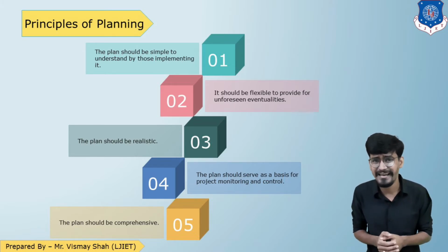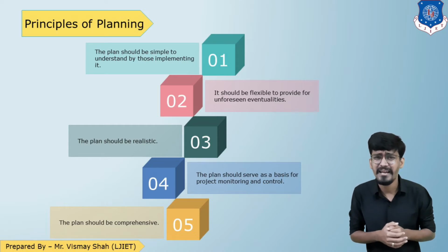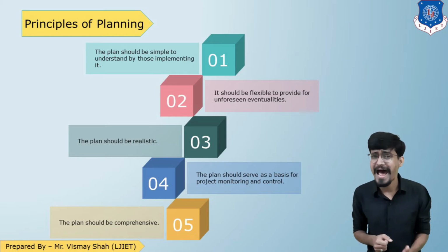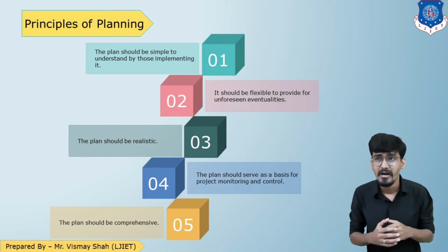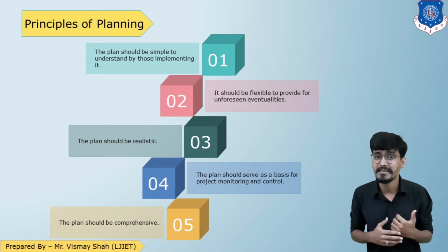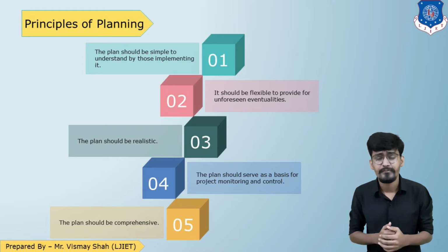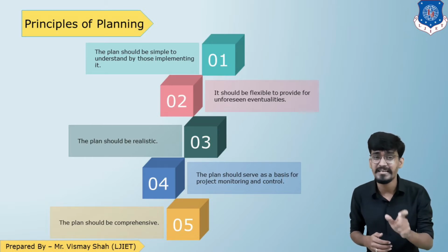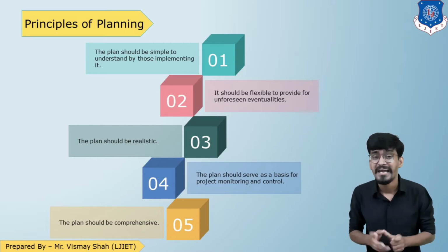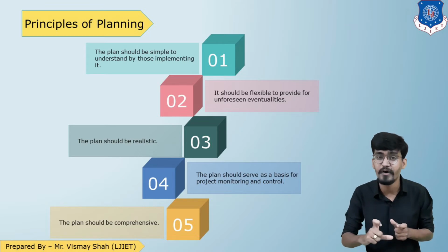The second principle is it should be flexible enough to provide for unforeseen eventualities. Students, you don't prepare a plan without estimating the occurrence of delay. For example, if I know that my project is going to start in monsoon, or one phase of my project is appearing during Holi time, then I will have to keep a buffer of 15 days.